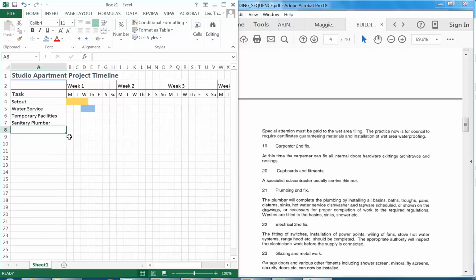for your building projects when you have something that you're building in reality, and you'll find that you need to adjust things as you go along as well, because trades will get held up and supplies will get delayed, so you often need to change these things, but you at least want to make a plan and have some idea how long everything's going to take, and especially which things can overlap. Also, which items need to happen in sequence. So some things, of course, can't happen until something else has occurred.